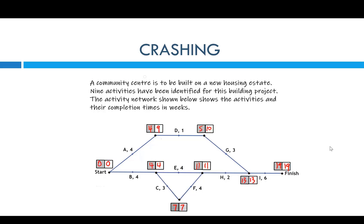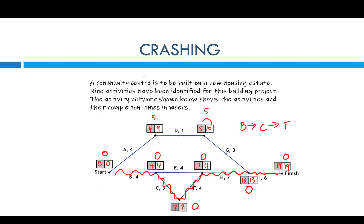So what is the critical path? We've got to look for float times on each activity where it's zero — that'll give us the critical path. Zero minus zero is zero there. There are zeros here, here, here, and here. The float time on these other activities is five. So our critical path goes this way, all the way through. The critical path for this question is B, C, F, H, I — giving us 19 weeks.